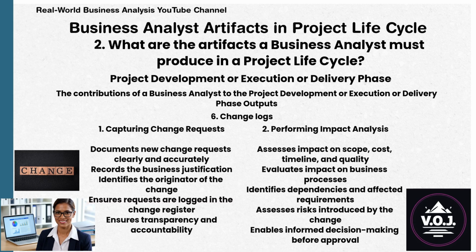2. Performing impact analysis. The BA assesses impact on scope, cost, timeline, and quality, evaluates impact on business processes, identifies dependencies and affected requirements, assesses risks introduced by the change, and enables informed decision-making before approval.